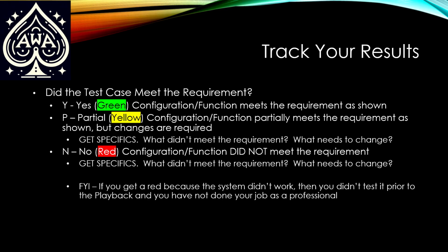Now, where it gets tricky is it worked, but it was like a bad account or whatever. If it's hitting the account that it's supposed to, and you wanted to change the account, in my view, it's green. It worked. It went to the account that you had given me. You want to change the account, that's great. But we mapped stationary to not stationary. It should have been to stationary. As long as it goes to not stationary, it works. You change it to stationary, it's still going to work. You've showed that it's going to something that's coming from a drop down or whatever, or some mapping. It's working. So it's coming down to those requirements.